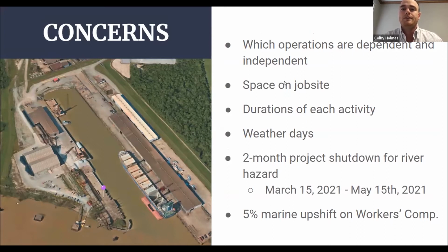Another thing that we did that's not usually included in a lot of construction projects is we did a 5% marine upshift in our workers' comp because it's so much more dangerous working over water than what it would be working over land.